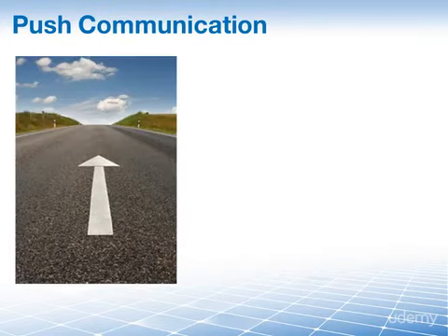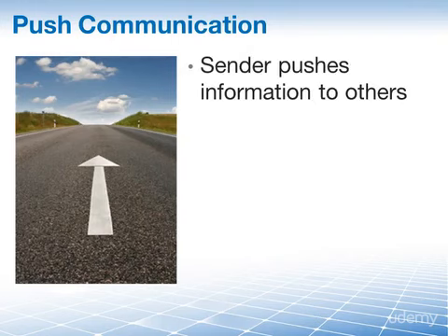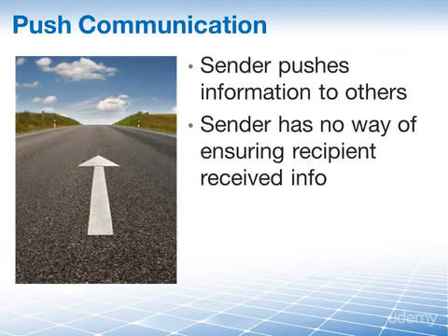You could also use push communication. This is a one-way street approach to transmitting information that relies heavily on an action by the sender. Its purpose, obviously, is that the sender pushes the information to others. We're talking about a real one-way street. I send something to the recipients. The drawback is, well, that the sender has no real way of ensuring that the recipient has indeed received the information, has consumed the information, or even understood the information.